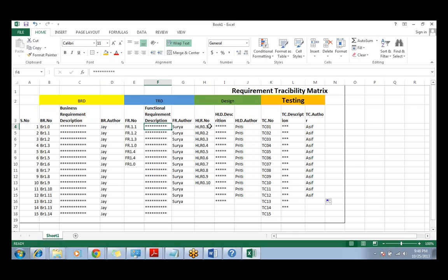That's what it is. Same the design team is going to do. The design team is going to look at the technical requirement document and align it in their design document to make sure it's a one-on-one match. If anything is missing, then there is a problem. And that problem can be identified way ahead of time when they are working on that design, when they are working on the technical requirement document. Okay? So they don't have to wait for the actual completion of the deliverables.